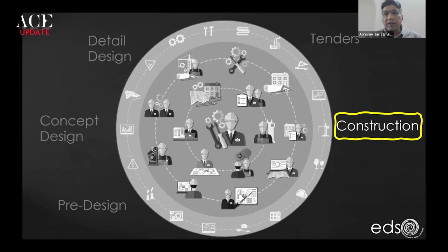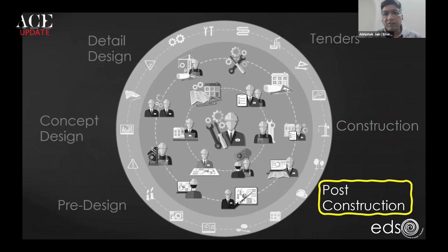Once the construction is complete, the design team facilitates the final certification by compiling all the certification documentation, and also ensures that post-construction aspects, which Akshay highlighted in his slide on operation and maintenance, are communicated to the ultimate user of the proposed project, as well as the facility manager, so that the desired performance can be maintained throughout the life of the building.